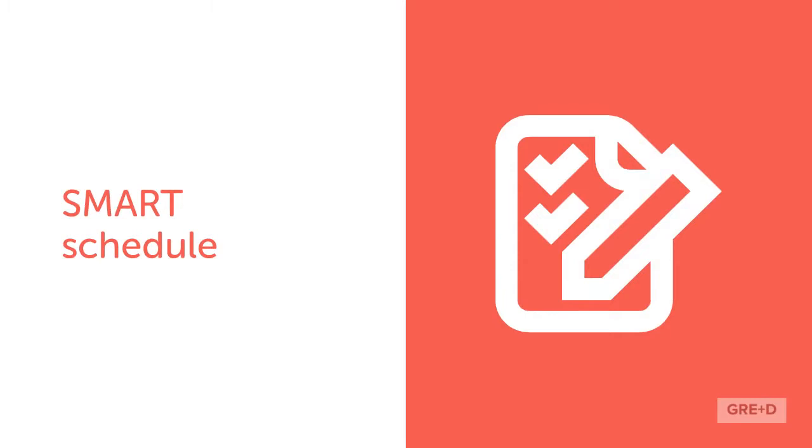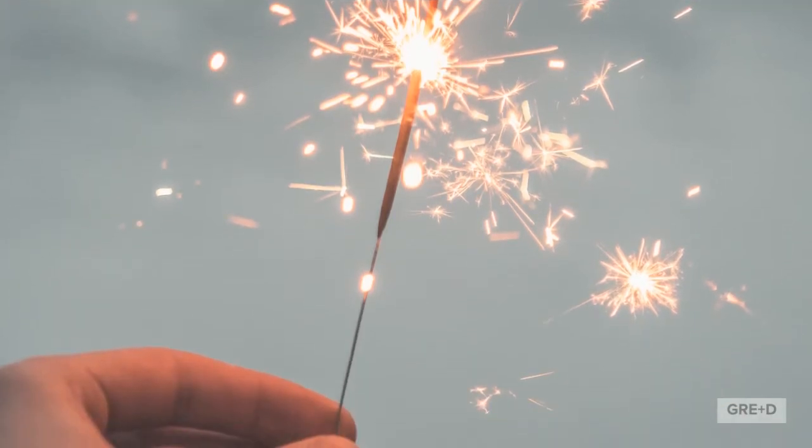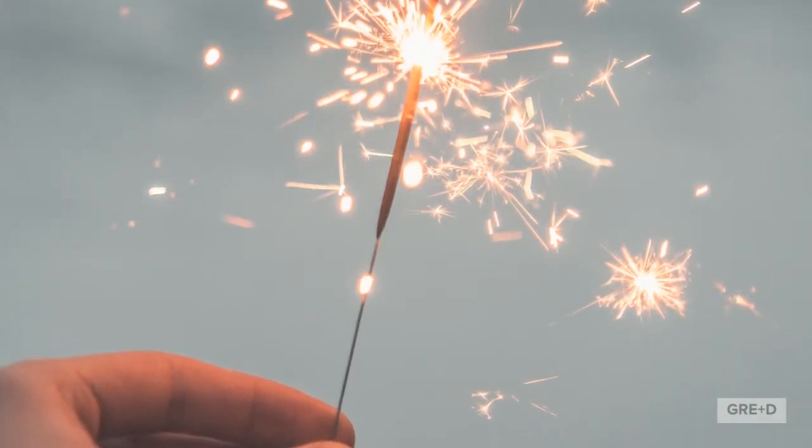Build goals and monitor progress against your schedule as you go. Just like your objectives, your schedule needs to set SMART, specific, measurable, achievable, and relevant outcomes at each checkpoint. As you reach a phase or sub-phase, divide the work until you have a weekly picture of the components you need to complete, monitor, and deliver. An HDR is a long haul, so pause to celebrate your progress whenever you can.